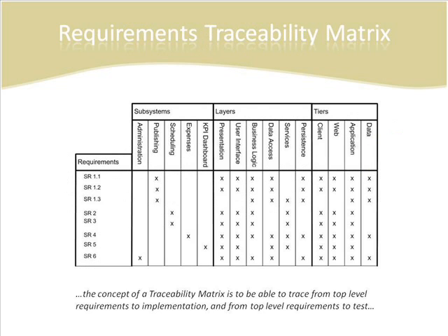A requirements traceability matrix may be used to check to see if the current project requirements are being met, and to help in the creation of a request for proposal, various deliverable documents, and project plan tasks. Traceability matrices can be established using a variety of tools, including requirements management software or even simple databases and spreadsheets. A traceability matrix is created by associating requirements with the work products that satisfy them. Tests are then associated with these requirements, and products are then tested against the requirements.